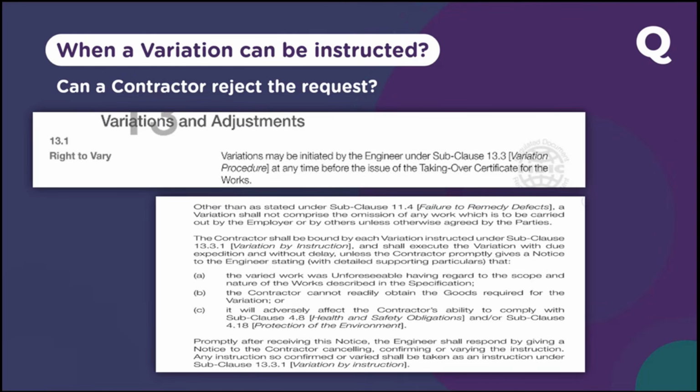Similarly, if we are told to prepare a chemical plant or maybe a small chemical laboratory, you should say no. What you're telling is not compliant with the environmental requirements. I cannot do it. Or if he's telling you to remove the mangroves without a permit, you should tell him, guys, I cannot remove this because it's against the protection of the environment. These are some example scenarios where you should say no to variations as a contractor.